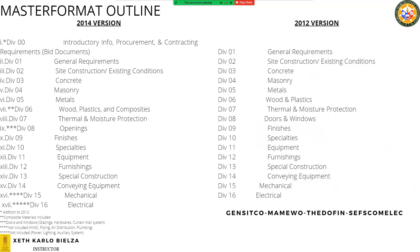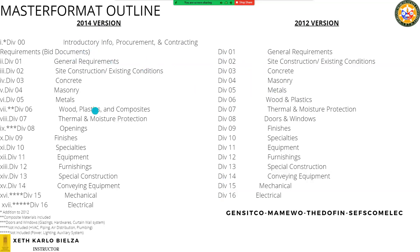In Master Format, the latest version is 2014, which now has 17 divisions. However, what we are going to discuss is the 2012 version, which has 16 divisions. What was added in the 2014 version is the bid or tender documents. Otherwise, they are mostly the same — with changes such as Division 6 being upgraded to 'Wood, Plastics, and Composites' whereas the older version was just 'Wood and Plastics,' and composite materials were added in. Division 8 was also renamed to cover all openings or fenestrations, whereas previously in 2012 it was just 'Doors and Windows.'